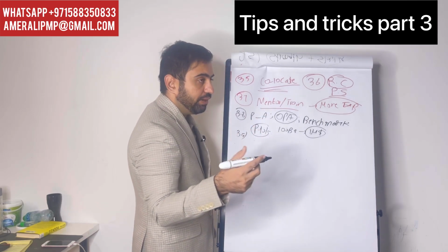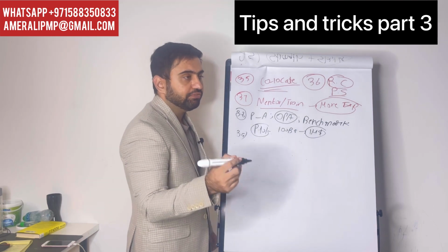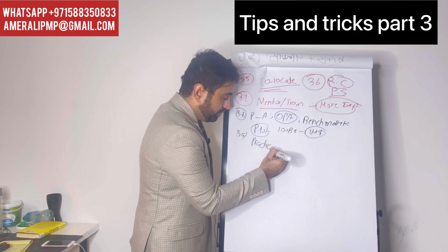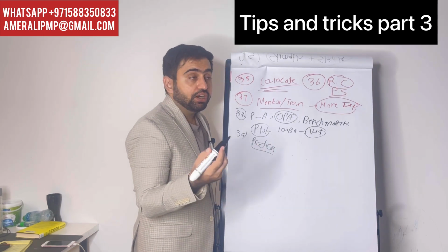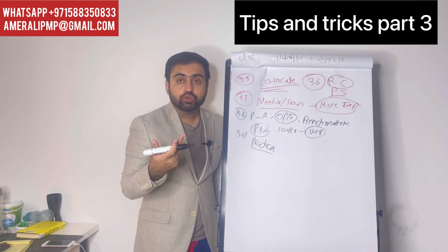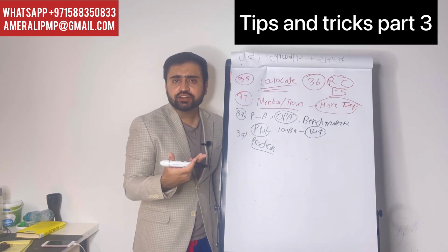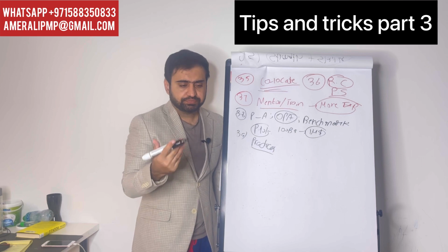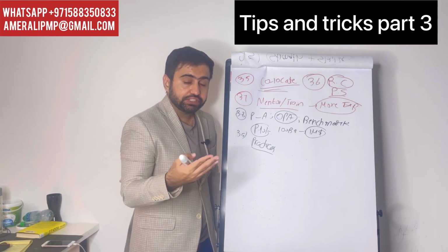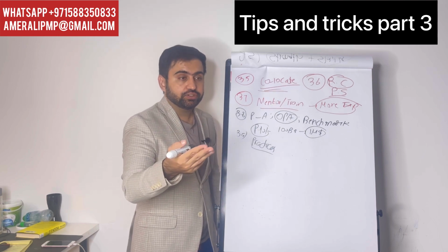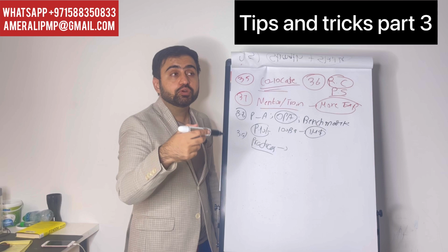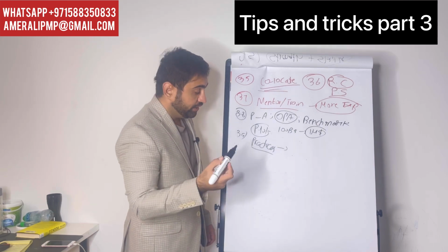When you are implementing that, of course, through the pilot project, but first implement some of the practices, like Scrum's daily stand-up. I actually do that whenever I go to a new organization, even in construction or predictive environments: we do daily stand-up. When you do daily stand-up, people see the efficiency and effectiveness of it, and then they start listening to you. First implement some of the good practices, and then implement the complete Scrum as you go along.